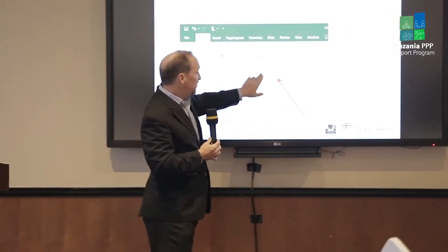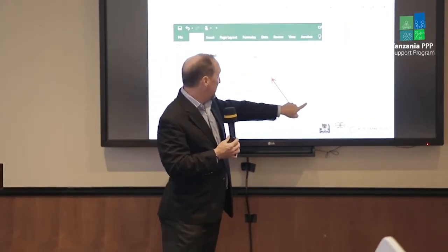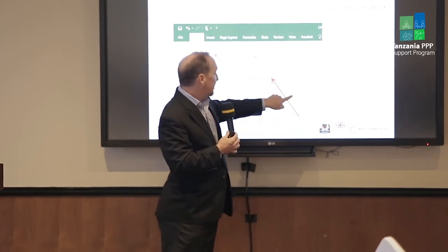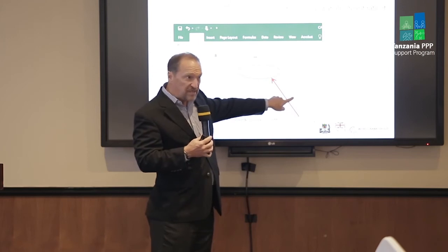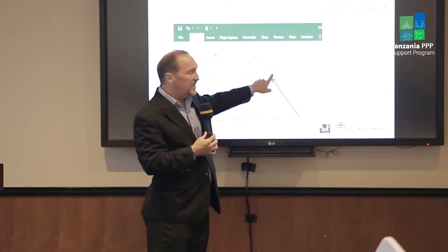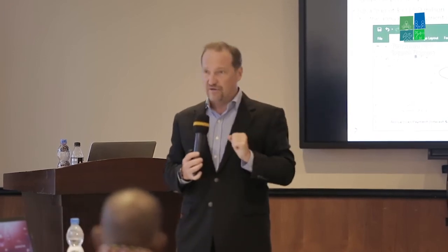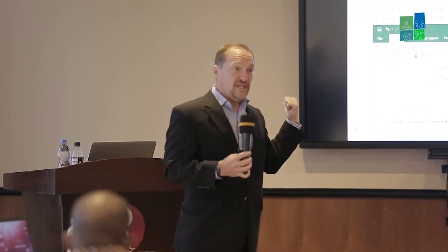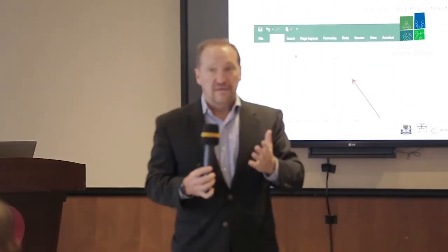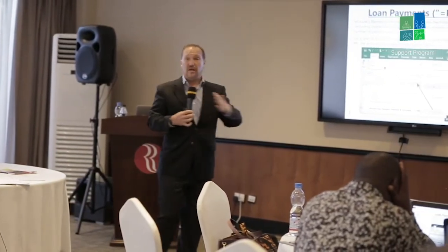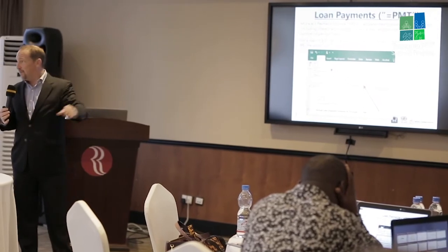And you'll see here that the major inputs are, first, what is our interest rate? What is the term of the loan? What is the present value, your principal value of the loan here? And then lastly, you put a 0 in if you expect that the loan is all paid off. If you say, what is the balance at the end of the term? Balance is 0. It gives you the flexibility if you wanted. Maybe you wanted to say, what if I want to assume that after 8 years I've paid off half of the loan? So I'm going to have a terminal value not of 0 but of 25 million. It could calculate then the debt service payments under that scenario.